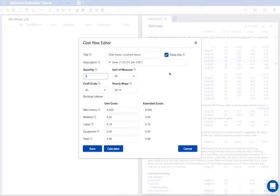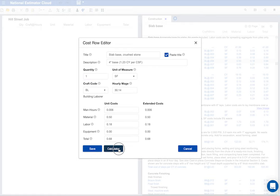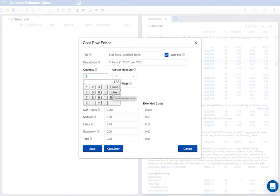Notice the cursor in the quantity box. I'll use the calculator to figure the total area. This slab is 27 feet long by 29 feet wide. Okay, our quantity is 783 square feet. I'll press tab and check the estimate.